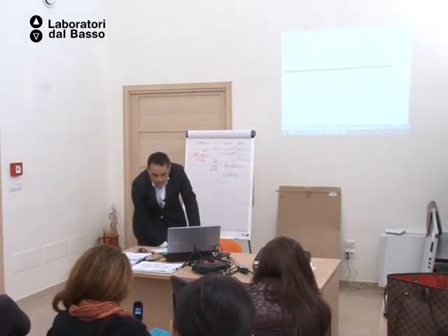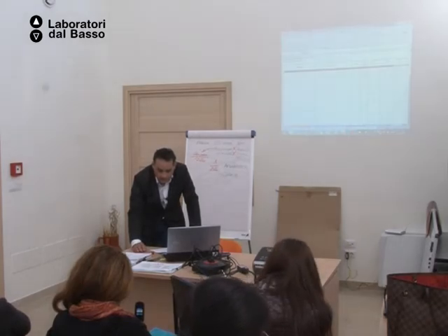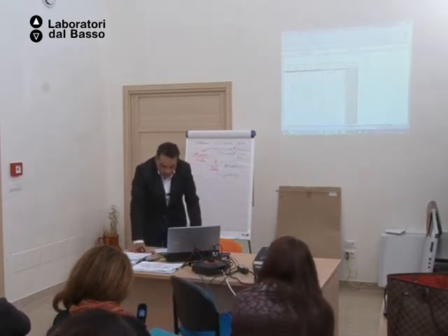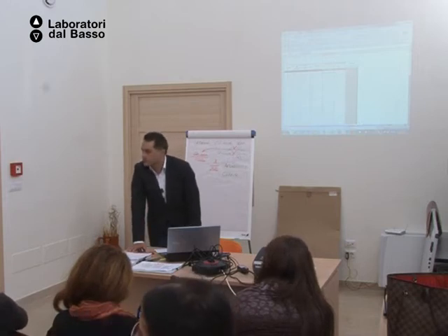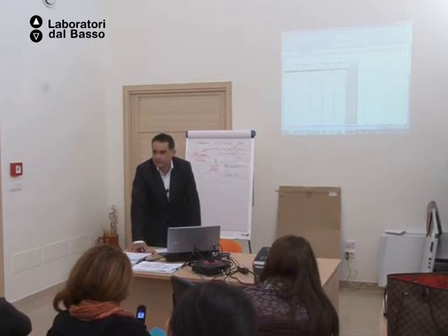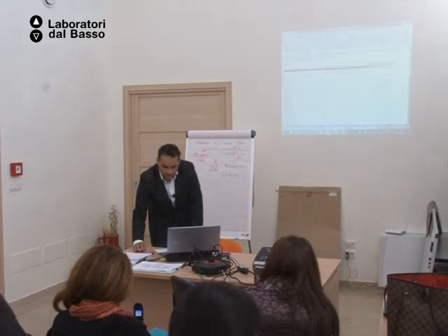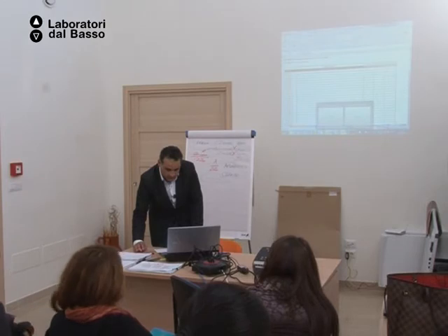For example, two computers or two equipments. The unit costs, B. What I mentioned on my slide, the usage rate is a question of a percentage. 50% of the time of the duration of the project, I will use this equipment, 20% of the time, and you don't use percents, you just put the number, 20, 30. If you buy on day two of your project an equipment that you will use until the day before the last month of the project, you have here 100%. Okay? And at this column here calculate well the final result of what you have been selecting on the equipment part.